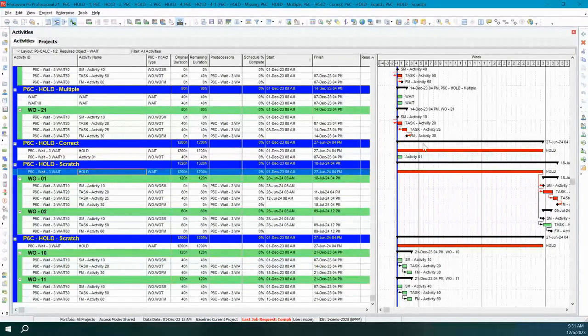So what we wanted the computer to do for us was to automatically create a logic tie to this new work so that it would go on the back of this bucket activity, to keep it out of our work window because we're planning in these next few weeks. So that's a lot of stuff. If you think that you're getting 10, 100 work orders a day, if I had to build this logic every time to hold these out, I'd be doing that all day long almost, okay? So we didn't want to do that.